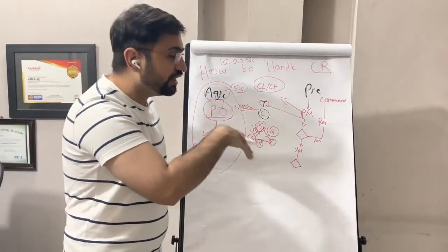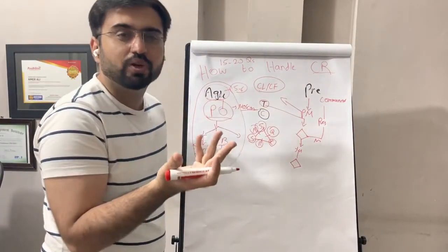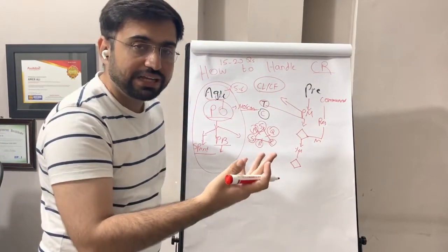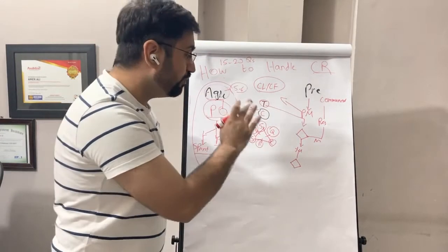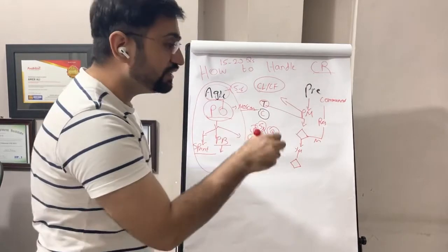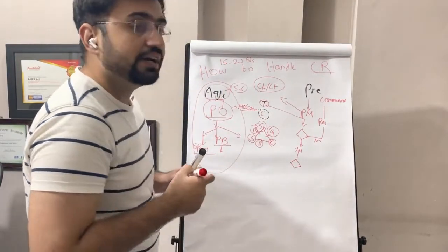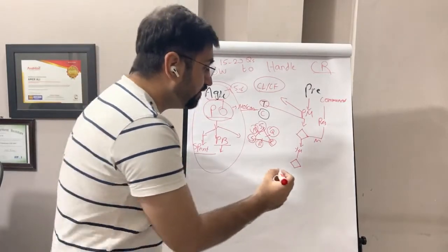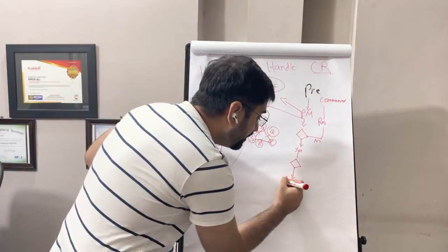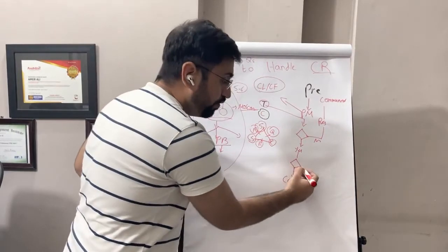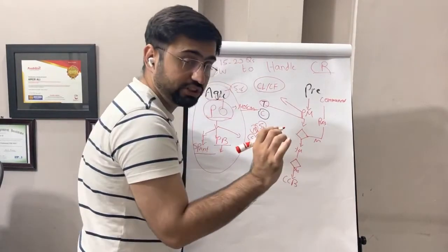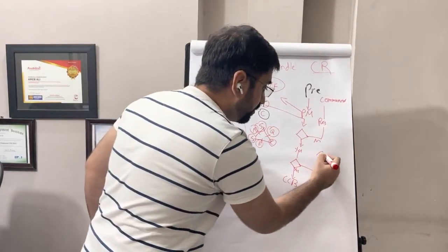So we are integrating all this change, and maybe how the procurement plan will be affected. All the plans, all the baselines will be checked here, and once the project manager or the project management team has done a detailed impact analysis, they will give it to the change control board. Now of course, if they consider the change important, if not, then again we communicate.